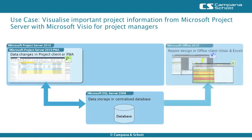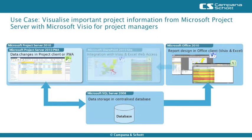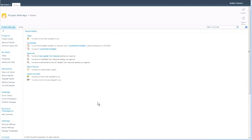Project status information from this database is connected to a map created with Microsoft Visio and a table in Microsoft Excel. By publishing both files to Microsoft SharePoint, a dashboard for Project Portfolio Managers is created and project status information can be tracked easily. The information is automatically updated based on current project data.